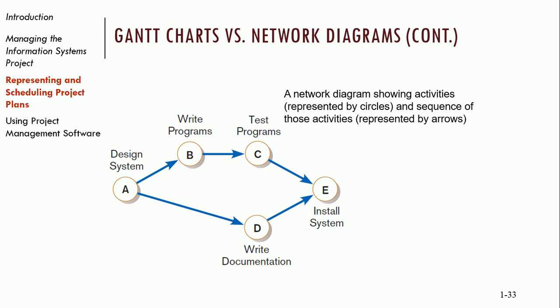Installing the system has two dependencies — we can't do it unless we've tested everything and we also have to have our documentation. So that task has dependencies on both C and D. Please don't confuse network diagram in project management with a network diagram in IT — they're very different. In project management, a network diagram shows how the different tasks relate to each other. If asked on a test, you'd say it shows how tasks are related, what the dependencies are — a nice visual representation of how everything is connected.